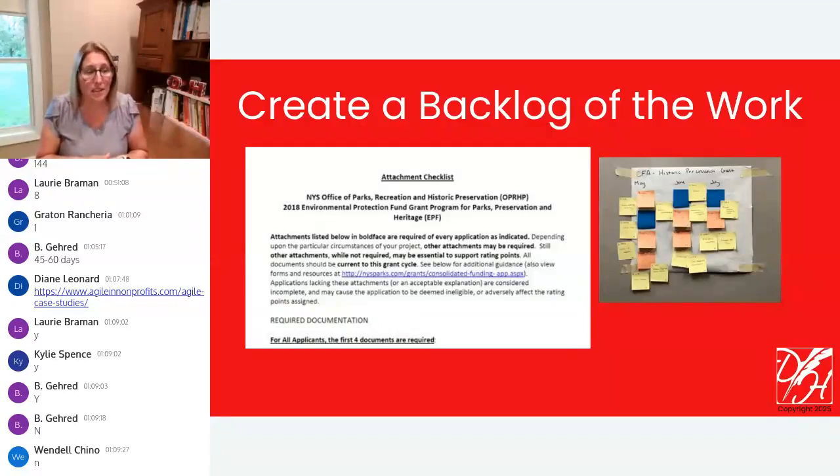On the screen, got more colors, different things happening. This is the breakout of the big application that was on your screen. It has the different versions of the narrative drafting process laid out. That's the dark blue. It has the different iterations of both the budget, the narrative part, and the budget, the number part, the form part, in orange. All those other yellow stickies, each one represented a different required customized attachment.